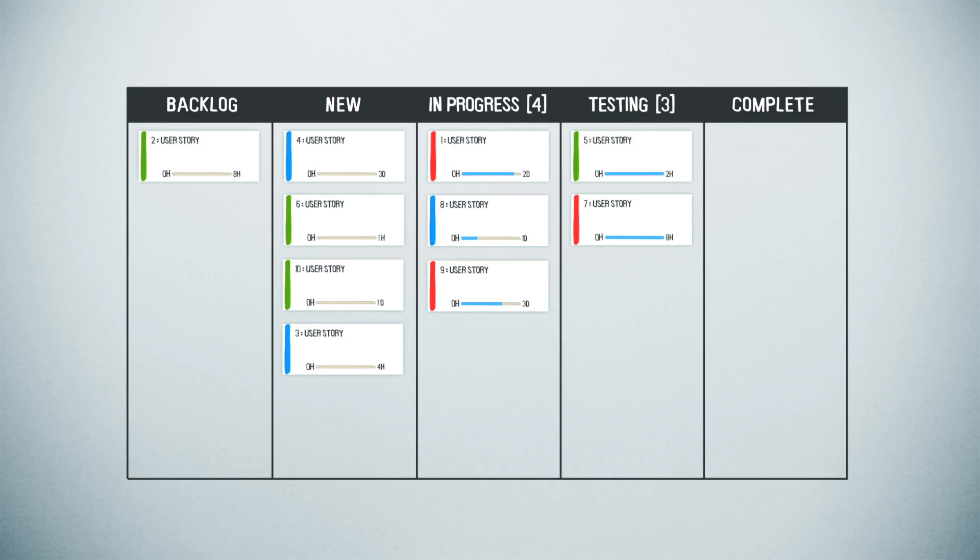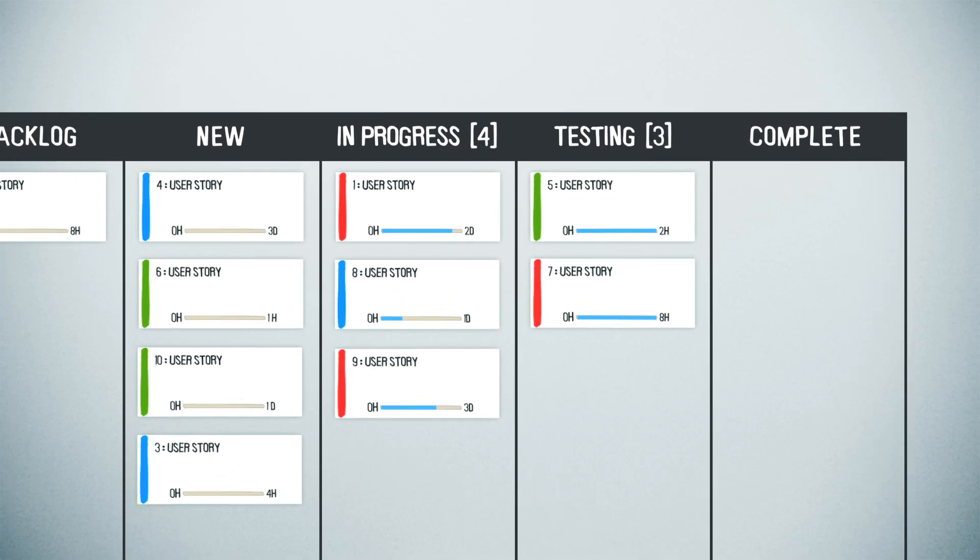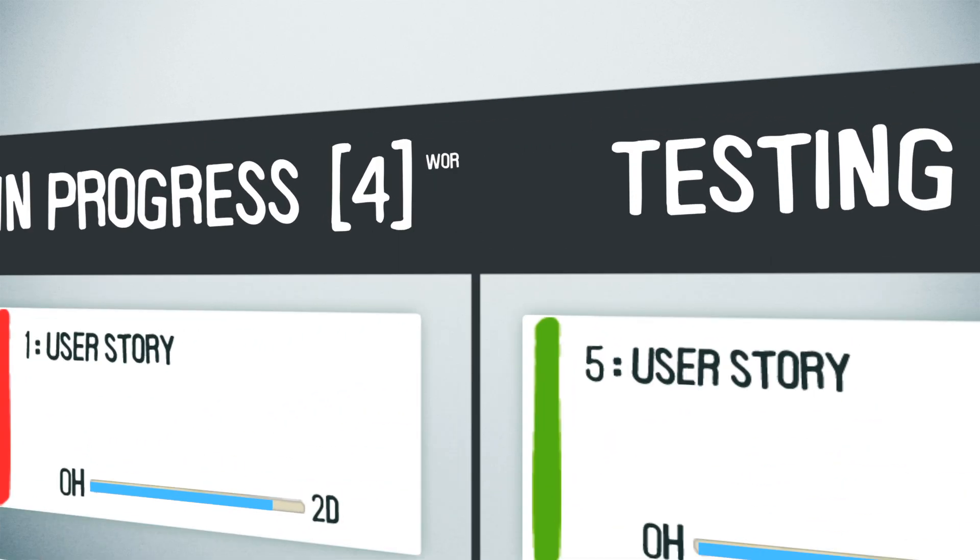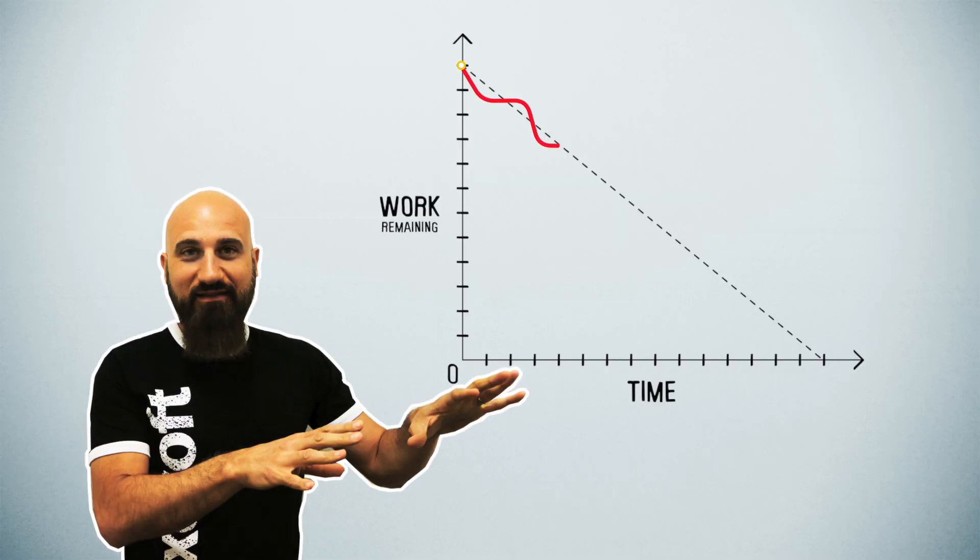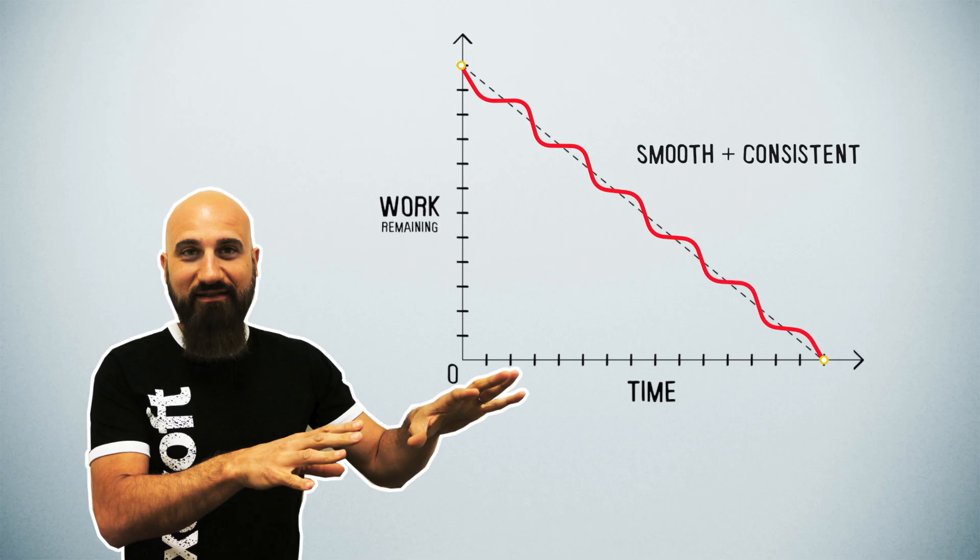To help ensure items are being completed at a steady pace, Kanban imposes limits on the number of items that can live in any one workflow step at any given time. These are called work in progress or WIP limits. They should be set so that the work flows as smoothly and consistently as possible.